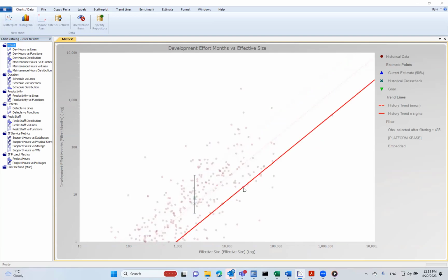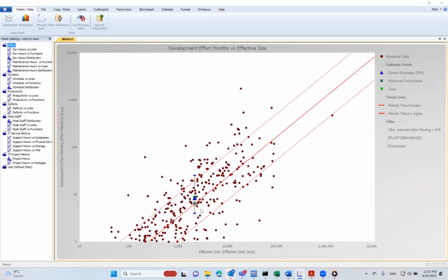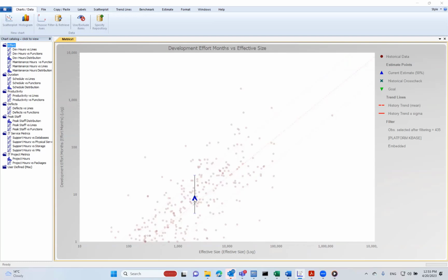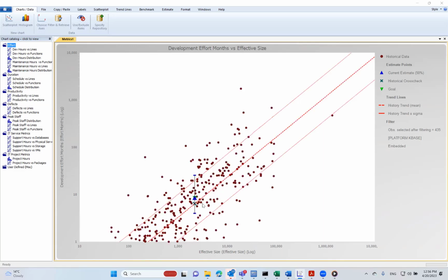So as long as our estimate is somewhere in that ballpark of plus or minus 1 standard deviation, we can have some confirmation, some sanity check, that the estimate is realistic, because other organizations that have done aviation DO-178 have achieved similar results or similar productivity.